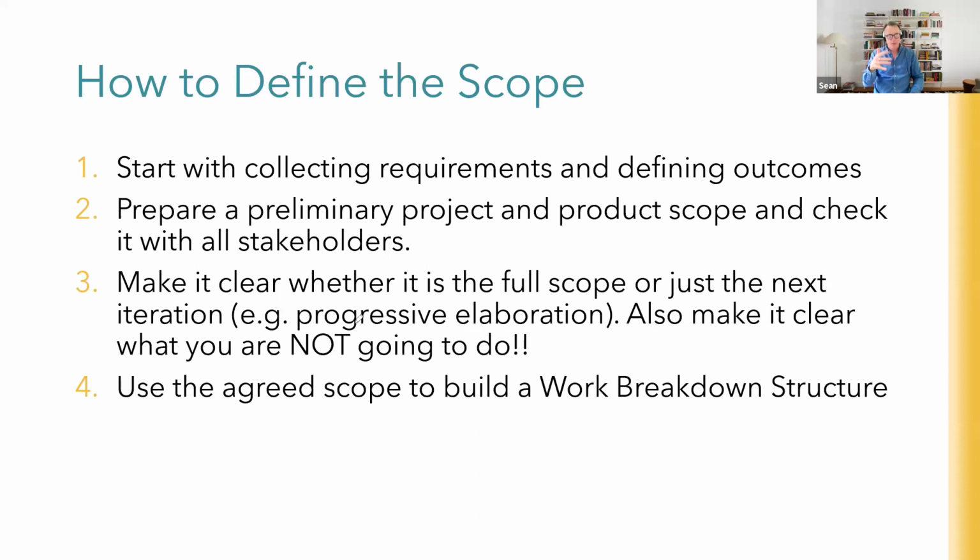Therefore, we've assumed that we can get back-to-back installation from outside to inside. But if we can't, you'll be responsible for any costs of extra carpentry work needed. I didn't think that would be a problem.